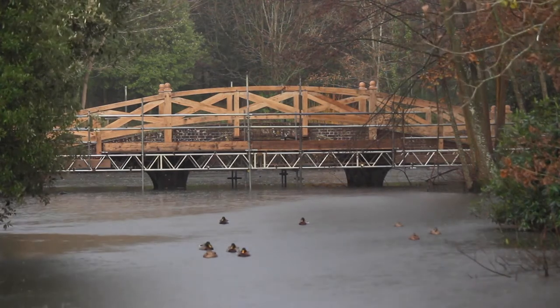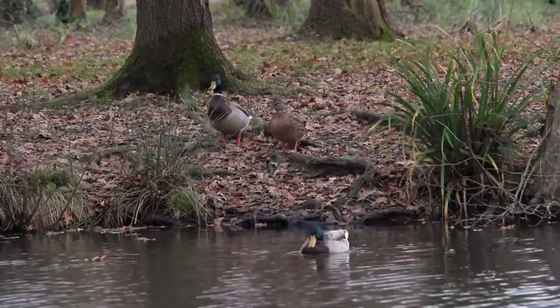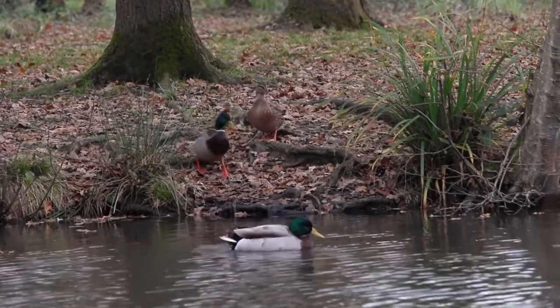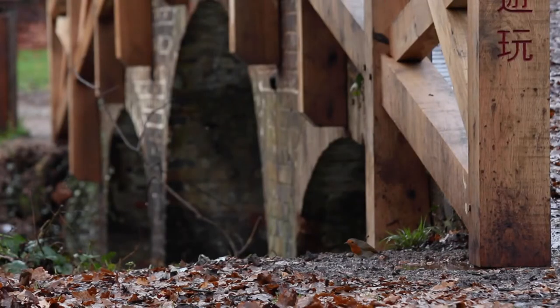Since we started the capital works back in the autumn in September, the weather was reasonably kind to start with, but then really the wet weather set in. And so we should have been much, much further ahead with all the path renovations. And we had to make sure that we fit in with the ecology, so things like bats and dormice and the reptiles. So all the work had to tie in with that and the bird nesting season. So there are constraints on time.